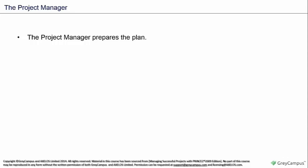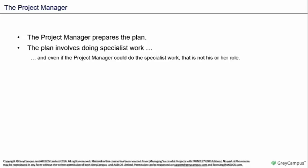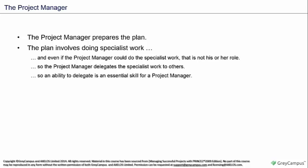Let's start by looking at some of the things that a project manager does. One of the most important things is to prepare the plan for the project, and the plan involves doing what we call specialist work. Specialist work will depend on the type of project - for example, if you were building a building, specialist work would be things like designing the building, laying the foundations, laying the bricks, or putting the roof on it. Even if the project manager can do the specialist work, it is not the project manager's role to do it, so the project manager delegates the specialist work to other people. An ability to delegate is an essential skill for a project manager.